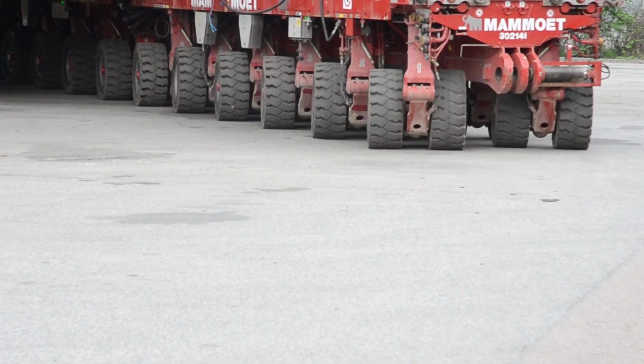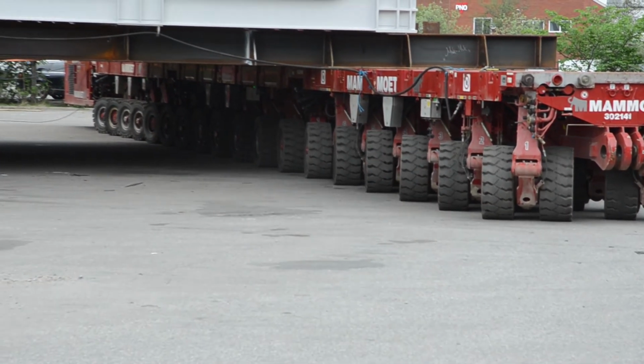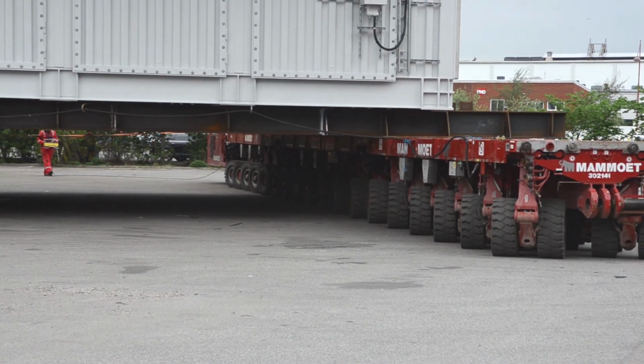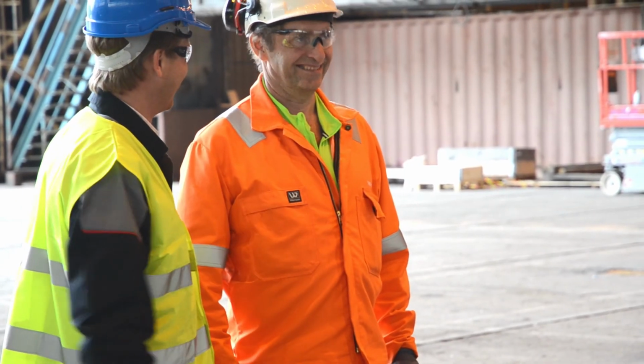The shipping company had another contract in the same time frame. So it has been with some luck and goodwill from their side, they still managed to be here within this loading window. The SPMT company, they had a contract both prior and after this one, so it has been a challenge also to get them to be here on time for this job. So we're standing here today with a successful operation. In 2-3 days, both modules are positioned at the right spot, and everybody's happy.